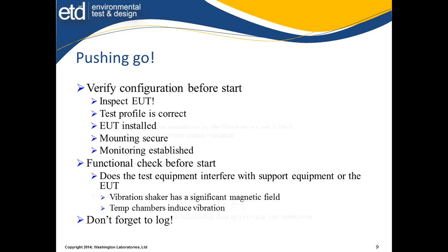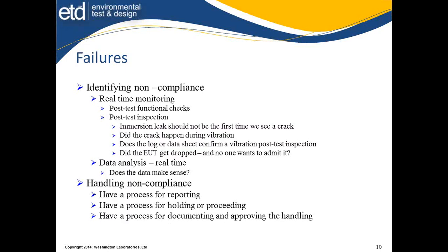I went through an episode not terribly long ago where we didn't know when it occurred. It appeared like somebody had hooked it up to the wrong voltage, but we didn't know that, and we had no evidence of it because it wasn't obvious that it was there. It was just suddenly not working, and the analysis took several days of failure analysis to determine that the event that occurred could not have been caused by the test that was happening, but it sure did hamper the test program.